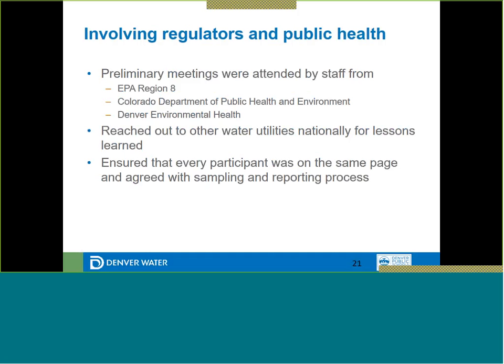We also insisted upon bringing in our regulators and the Public Health Agency when we set up the procedures for this testing program. As I talk with other utilities across the nation, I find that that's an unusual step, but I'd strongly urge you to put your state health department, your EPA region, and your county health department at the table when you start talking about what you want to do. The feedback I received from our regulators and the Public Health Agency was that they valued this experience and gained insight into our plan.